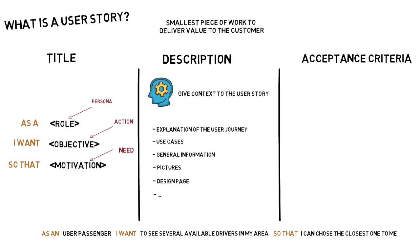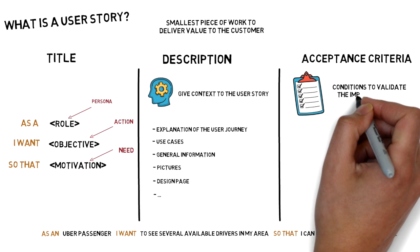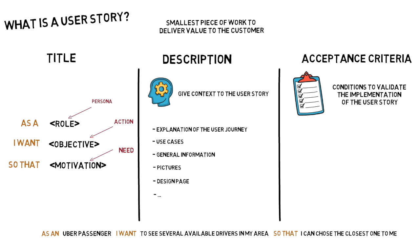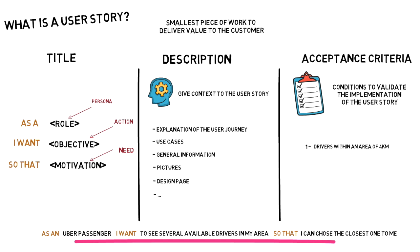Along with the title and description, one last important element that should be included in the user story is the acceptance criteria. These are a set of conditions that help us validate the implementation of our user story and confirm when it is completed. For our Uber passenger example, acceptance criteria could be: the app shows only drivers within 4 km from the customer; the app shows maximum 10 drivers in the same area; and a customer can check the profile of these drivers, including their picture and rating. The acceptance criteria help us understand key characteristics that require special attention during implementation, and going through them with the team at the time of writing is the best way to fully develop the functionality.